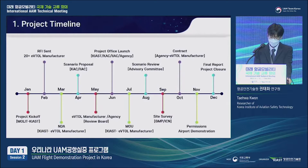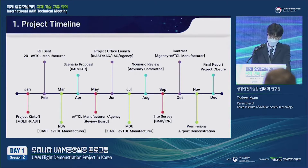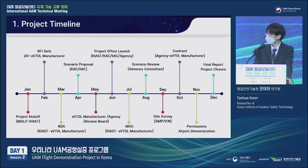Now I will briefly introduce the timeline for the flight demonstration project. This project was initiated in early January last year, led by MOLIT, in order to promote the introduction of UAM service and improve social acceptability. In February, a request for information was sent out to some 20 domestic and overseas eVTOL companies to secure the UAM aircraft needed for the program. Only a few companies showed a positive response, and an NDA was signed with a German eVTOL manufacturer for further communication in March.